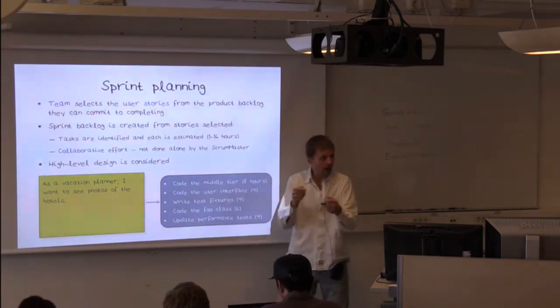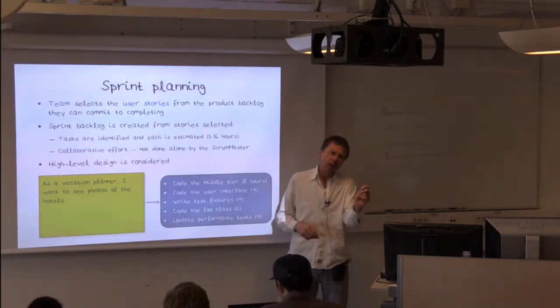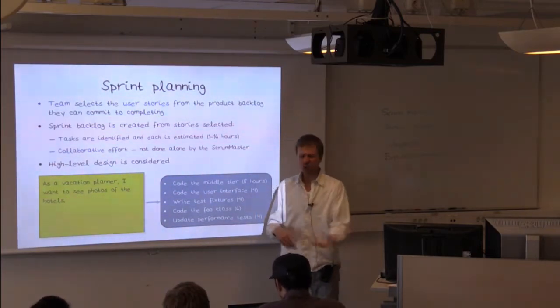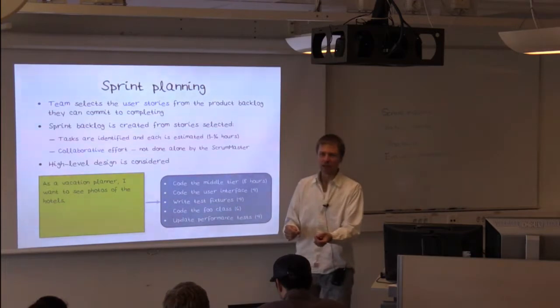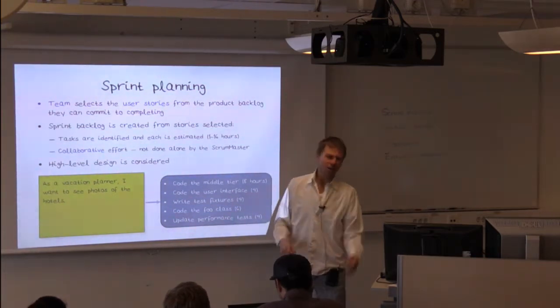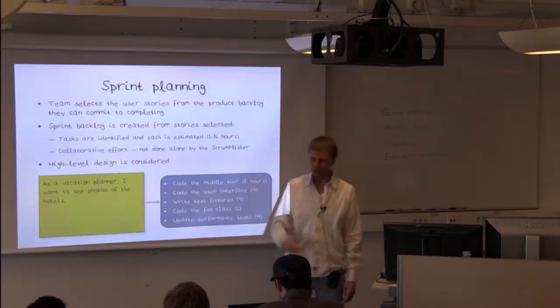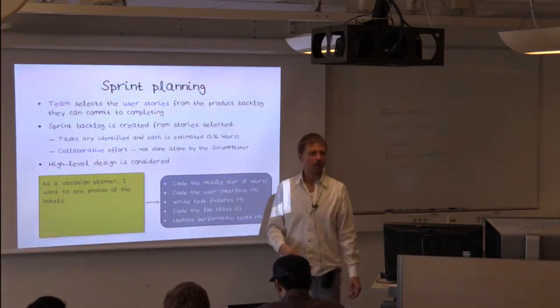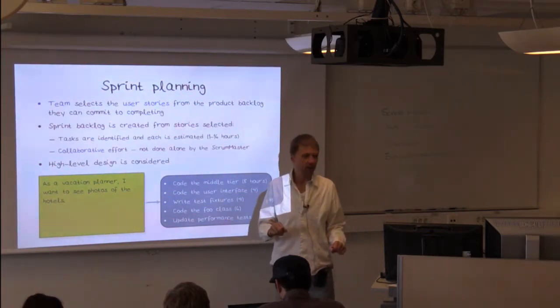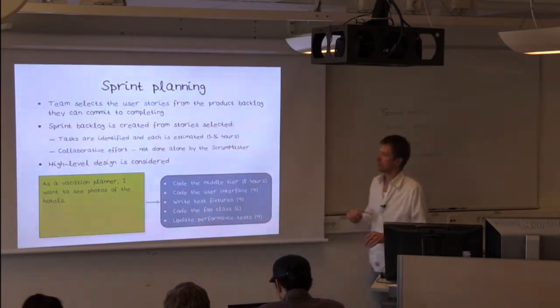You talk about it, and one person might say, well, I think this is really difficult. It's going to take me 8 hours. And somebody else on the team says, what are you talking about? All you need to do is this and this and that. And the first guy says, oh, you know what? I didn't think about that. You're right. It's only 2 hours. It's not 8 hours. Right? So this collaborative discussion about it increases the quality of your estimates significantly. And we'll get to that too.